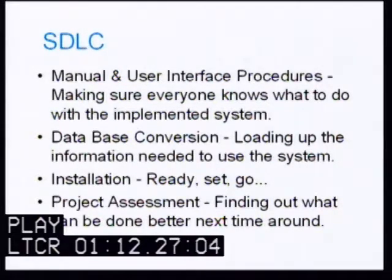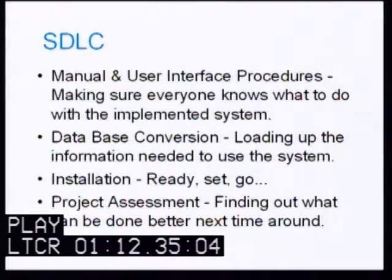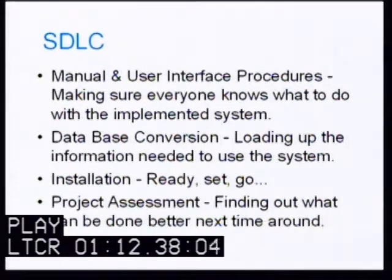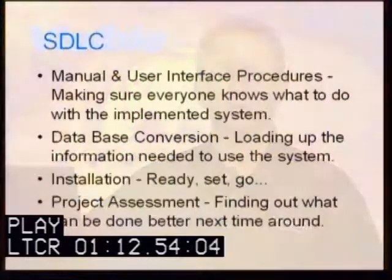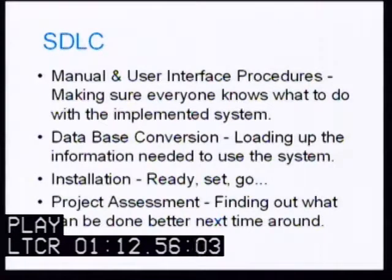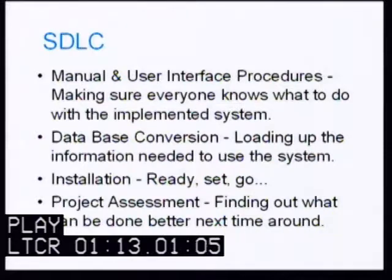Following that is oftentimes a database conversion, loading up the information needed to use the system. Then the system is installed and we're ready to go live. The last step is project assessment — finding out what can be done better next time around. This last item is, unfortunately, frequently left out, harping back to the reality of the capability maturity model level of most IT shops.